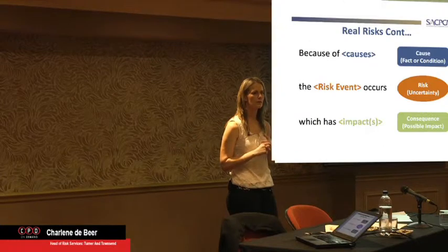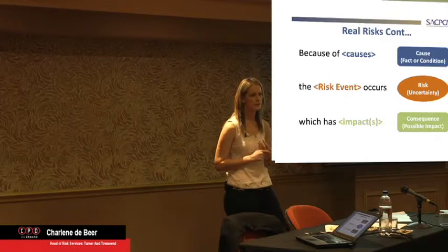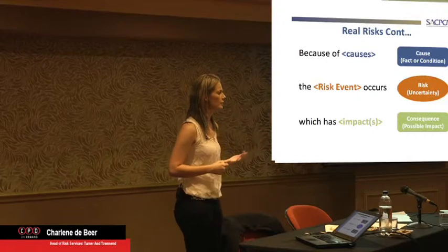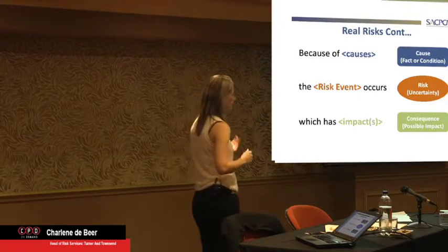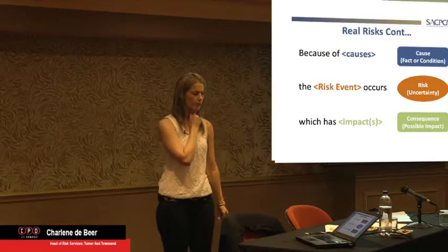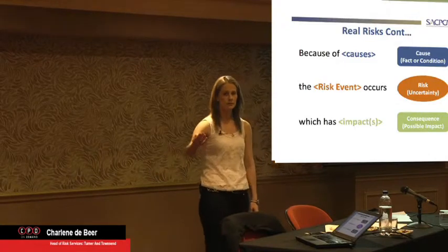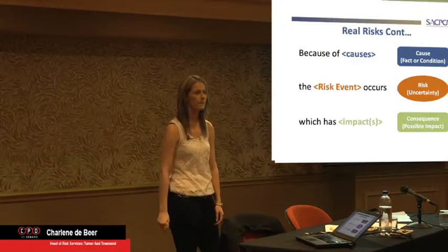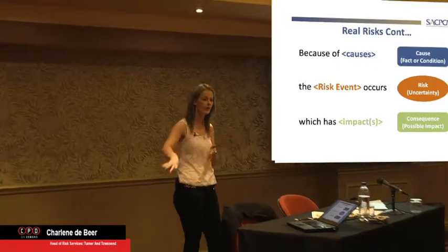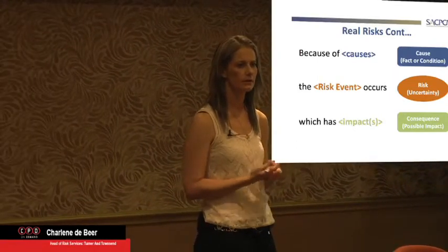And risk is also what we foresee or what we think might happen. And we also identify risks from lessons learned, 100%. But if it's a new project we're doing somewhere in Africa, in the DRC, going to Congo, we've built a reclaimer for a mine there before. We know they've got political wars, guerrilla wars. We know we face a lot of country risks within Congo, for example. A lot of things we know, lessons learned, what's happened. We ask previous contractors that have worked there. We do our homework. But there is still uncertainty that we face within that environment.